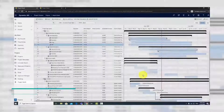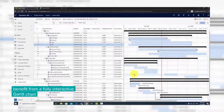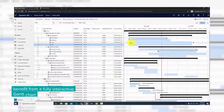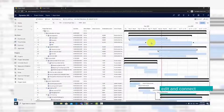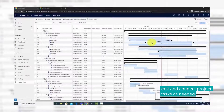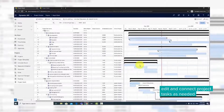Use the interactive Gantt chart to create dependencies between tasks, as well as adjusting project structure by extending or decreasing the task duration or moving it in the schedule.